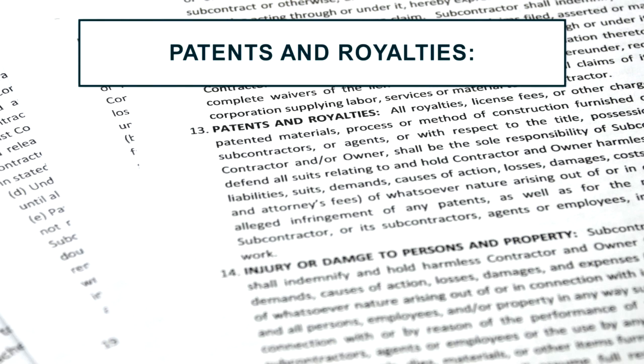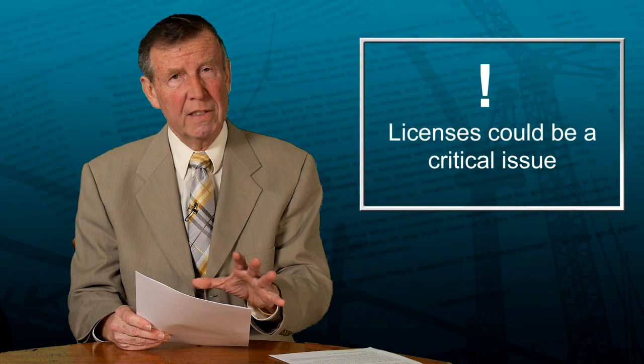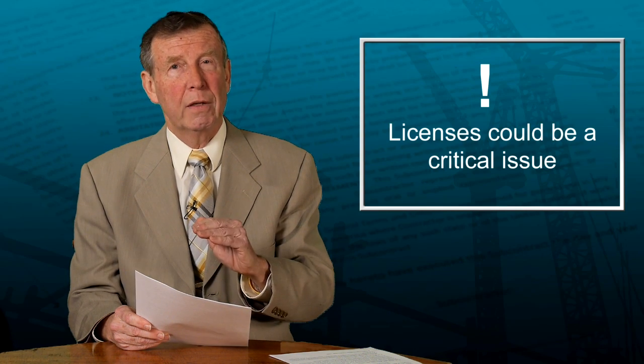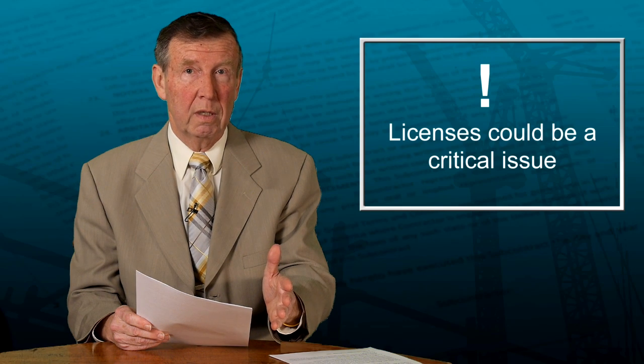We see paragraph 13, patents and royalties. All royalties, license fees, and other charges are your responsibility. Now, you might think royalties aren't going to be that important, but I do draw your attention. Once again, license fees could be a critical issue, so be sure you're licensed to not only perform work in the area in which you're working, but also licensed to put in place the material and equipment you're putting in place. That can be a factor. And recognize you are solely responsible for doing that.